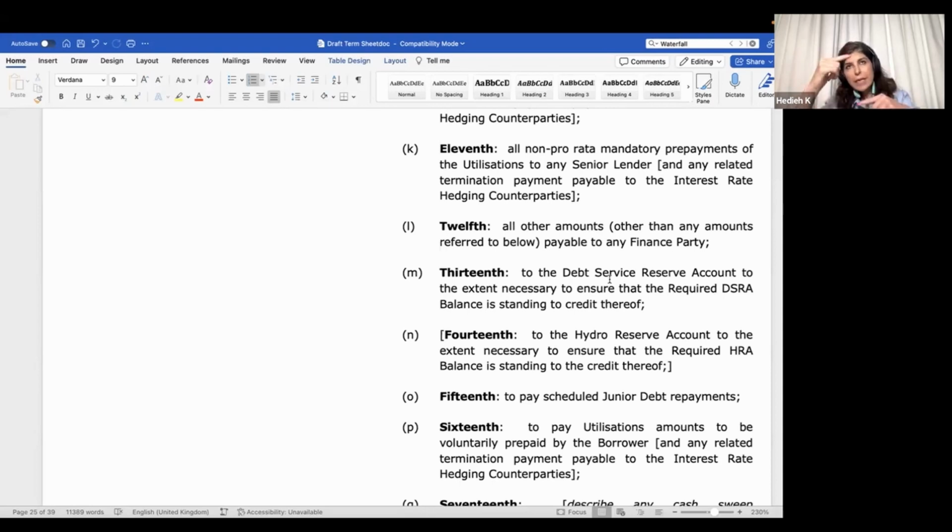So the ranking is important, remember, because it defines this line that we call cash flow available for debt service. It also changes the calculation of the ratios that we're going to present based on that, and the debt sizing as well.